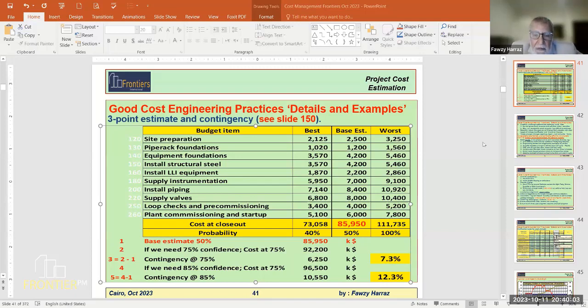Okay, are we still online? Yes. If we have a similar project here, we can ask him. So there are various options apart from the vendor if he's not responding. But each figure we have has its quality regarding when it was built, if it's the same specifications, same service, if it is the same size.